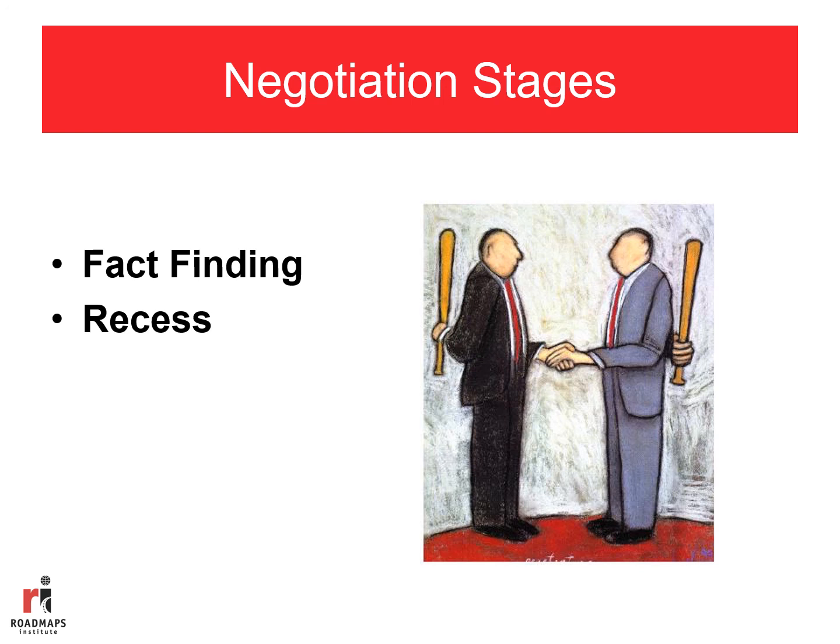The next stage after fact-finding, because fact-finding usually requires an adjournment and then coming back together, is a recess that will occur at different points. Now, you're not going to call it a recess. You're just going to say, okay, well, let's get back into our discussion next week or 2 or 3 days later after I get the information. But anyway, it's during the recess where the negotiating team should reassess what it wants to achieve from this particular project and whether or not it wants to review and refine its project value estimate and any other estimates or assumptions.